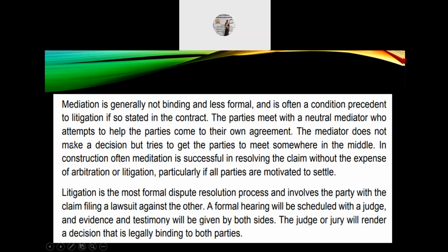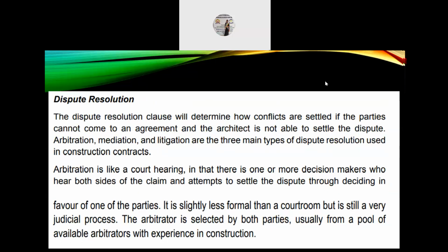Dispute resolution. The dispute resolution clause will determine how conflicts are settled if the parties cannot come to an agreement and the architect is not able to settle the dispute. Arbitration, mediation, and litigation are the three main types of dispute resolution used in construction contracts.